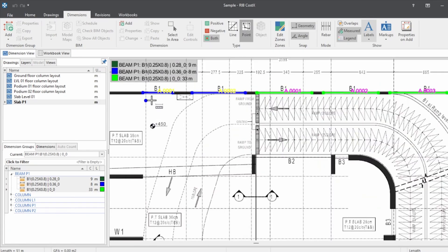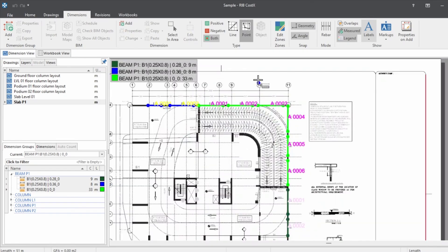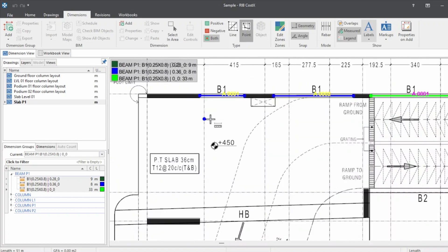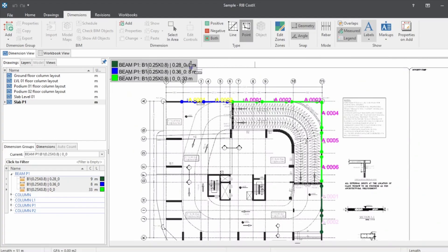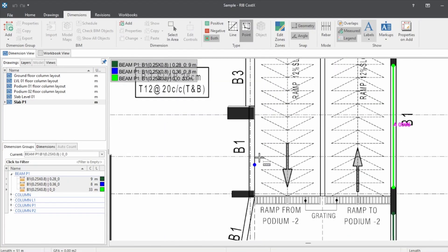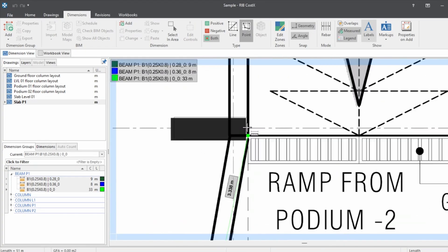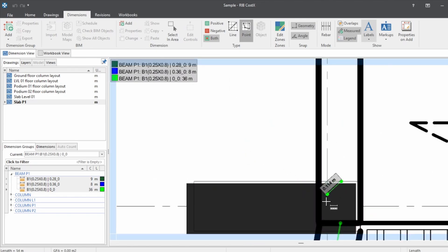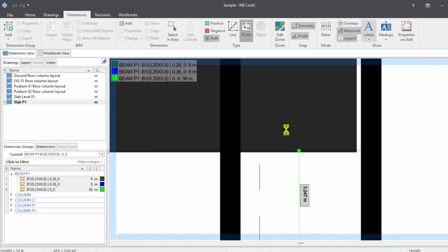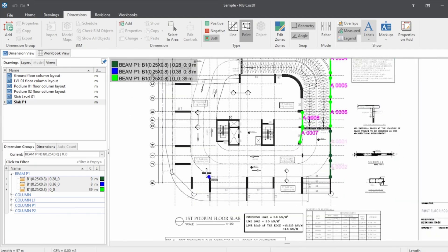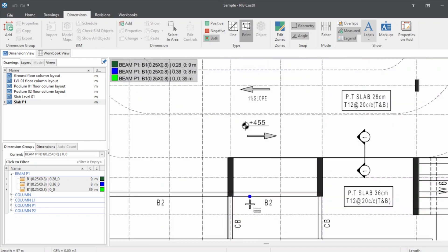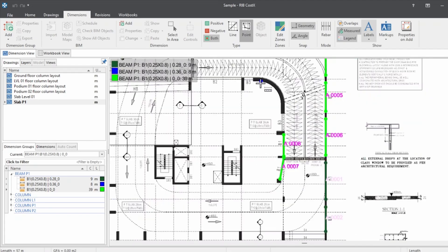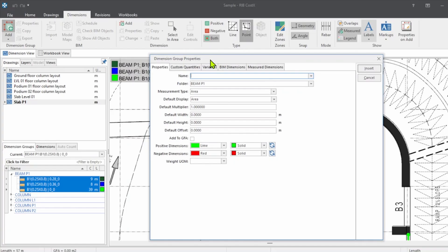So now the outer beams of two sides we have marked. From here you can notice we used three types of description because of the slab thickness. Let us see if there's any B1 here. We have the B1 beams here, also we have B1 beams. So let's mark these beams as well. When the structure is not in definite structures, the beams might be in random areas, so we have to look at each and every place to understand the layout of the beam to avoid missing of items. Now I will follow the same steps for all other beams.